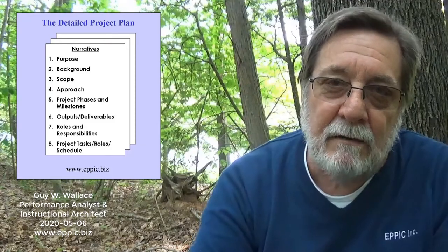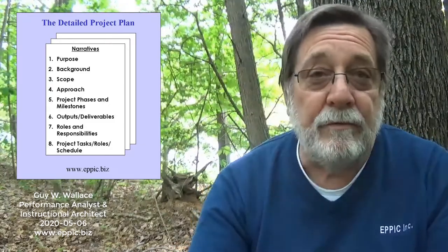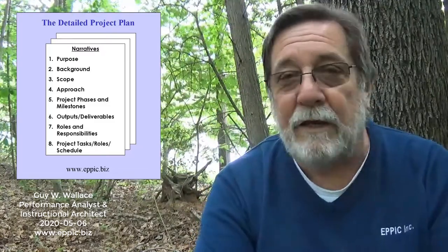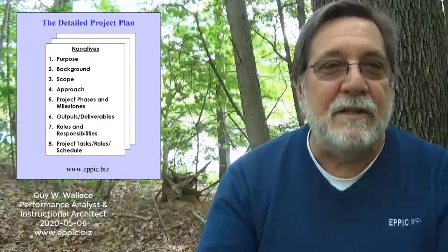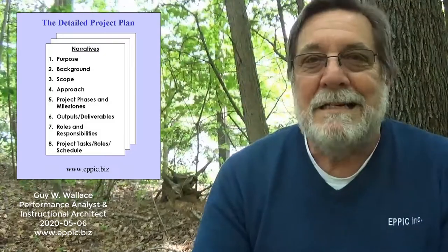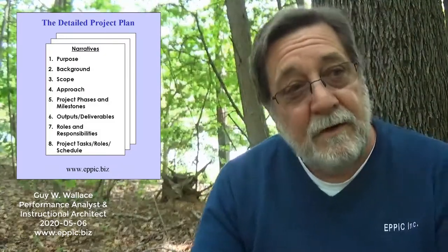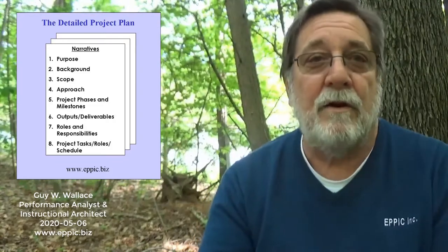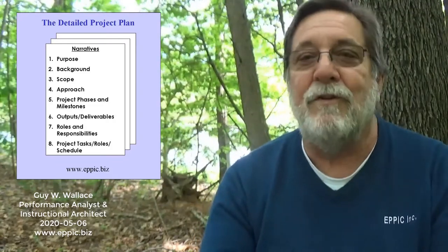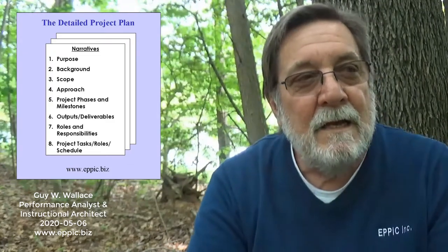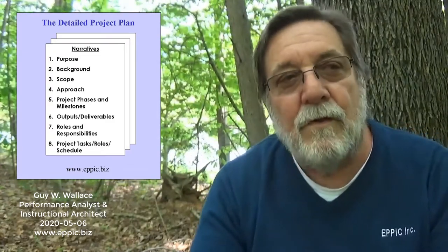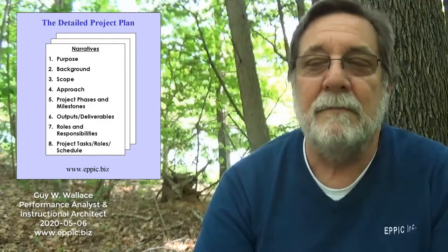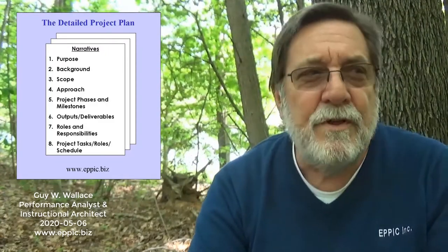and then give us their feedback and critique. And we'd take that back to the project steering team and say, here's what the original analysis group that you handpicked told us, and here's what these other people said, some of which we're not too sure about because we don't know that they're in the target audience. If you ask somebody for their opinion, they're likely to give it to you whether or not they have a valid perspective to give you an opinion on in the first place. So we would have to reconcile that, and that would slow the project down a little bit and cost more because of the increased touch time. And we'd do the same thing with the design.